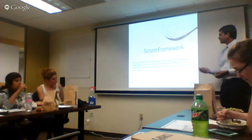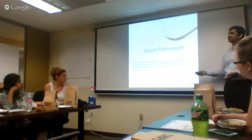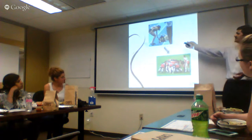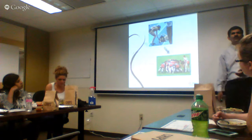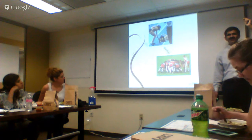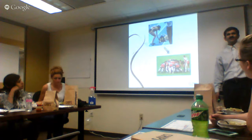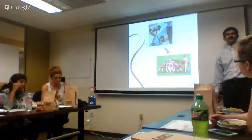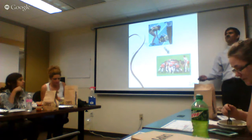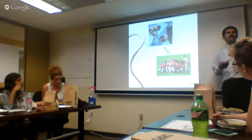But Scrum is a flexible development strategy where the development team works as a unit to reach a common goal. This is what we see in a waterfall methodology: a relay race. Once you pass on the phase, if you are crawling, then all other phases suffer because of that. If the requirement takes longer, or coding takes longer, who suffers? Testers suffer. Most of the time, testing time gets reduced or sometimes gets skipped.